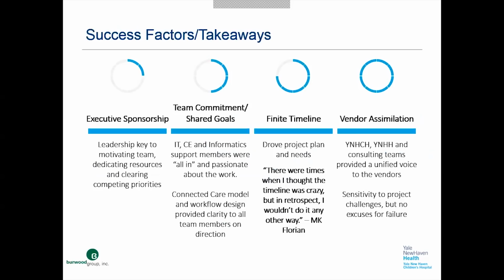So that aggressive, focused approach really helped. And then vendor assimilation, really what we mean there is that there were a lot of folks at the table here, a lot of vendors that were putting a huge amount of effort towards this, and it wasn't always easy for them. And the way that we managed that was that we, from the consulting side, we spent time on weekly calls with our program manager, Maggie, and her job was really to make sure that she understood individually what their concerns and risks were so that she could manage them across the project.